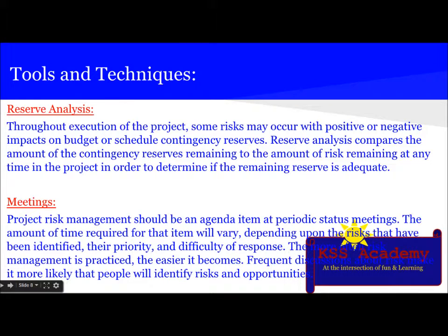The next technique is reserve analysis. Throughout execution of the project, some risks may occur with positive or negative impacts on budget or schedule contingency reserves. Reserve analysis compares the amount of contingency reserves remaining to the amount of risk remaining at any time in the project in order to determine if the remaining reserve is adequate.